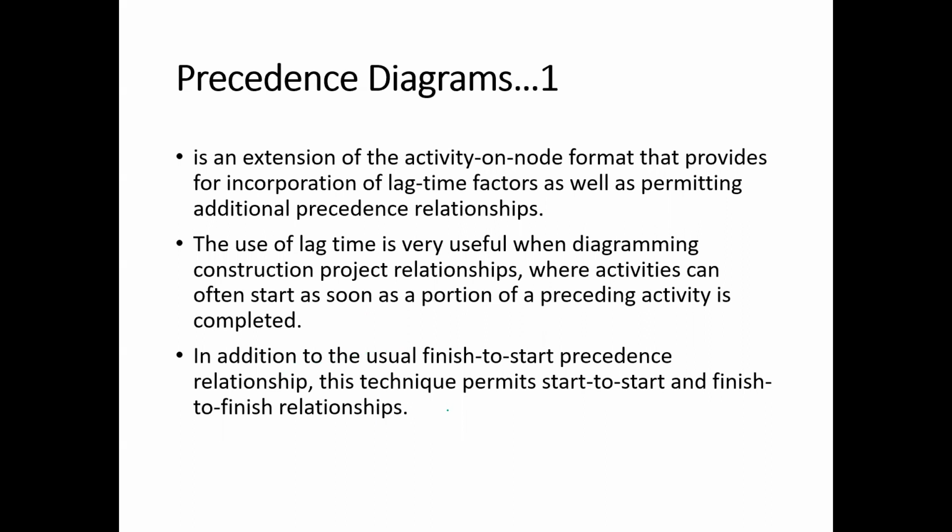So for example, you can represent a lag time between the pouring of the concrete and the next activity. You can represent the lag time as a kind of waiting time. So after you pour the concrete on the slab, you need to cure it for some time.